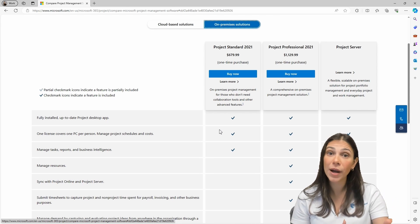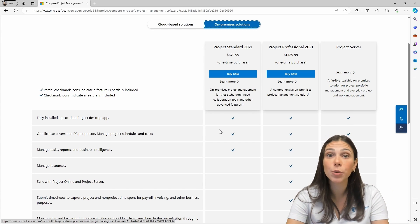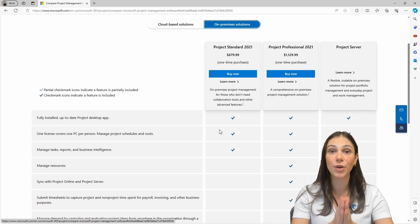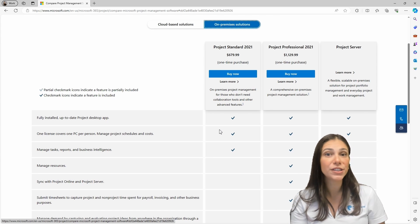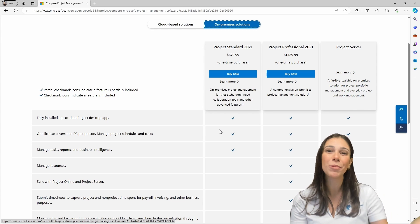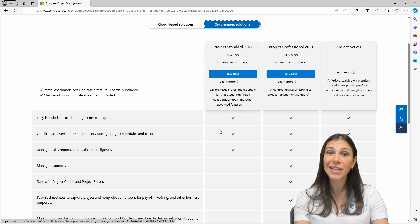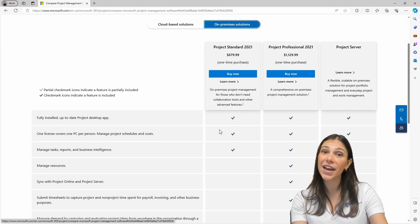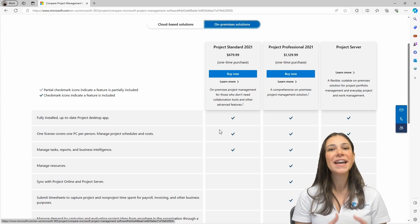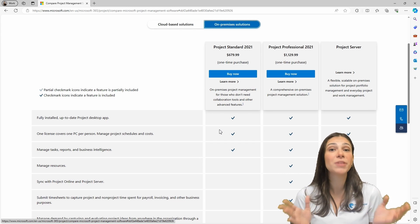Project Online will give you the option to upload your project so you can share it with others. You'll also be able to use enterprise resources as a pool so you know exactly when each person is available. You will be able to create a SharePoint site to upload documents related to your project so you have everything in a central location. You can customize fields for the entire enterprise, and you can submit timesheets on Project Online. If a resource takes time off, that time off would be taken into consideration when assigned to your project.